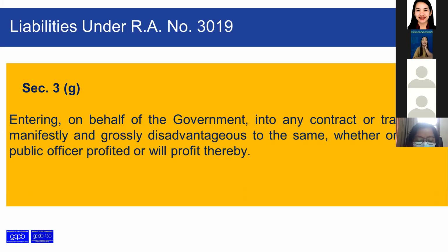Pasok nga sa ABC. Pero had it been a proper market analysis, had it been you were doing it during pre-procurement activity, kung meron man kayo, kung required man, na-discuss nyo yung all aspects ng procurement, hindi sana ganyan. Hindi sana tayo malugi. May mga ganyan pala na 600 or 700 lang. So sana na-set yung price in the mid range. Kasi wag masyadong i-accommodate natin yung profit. Kasi may profit sila, but hindi din tayo lugi. Hindi naman Santa Claus yung gobyerno. No? So, kahit nga isda, tinatawaran nyo, di ba?